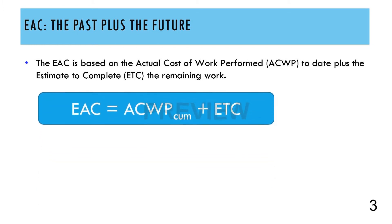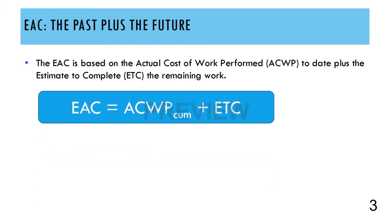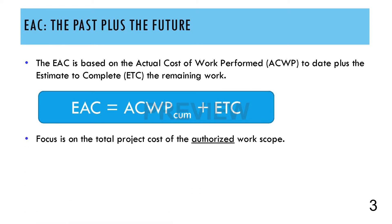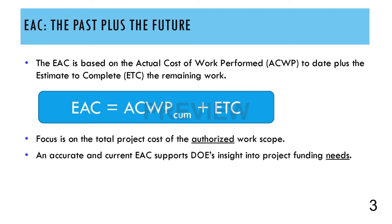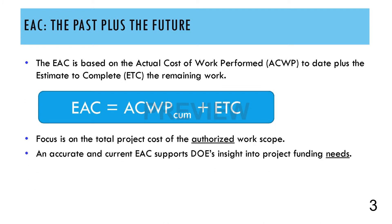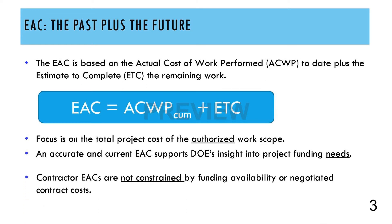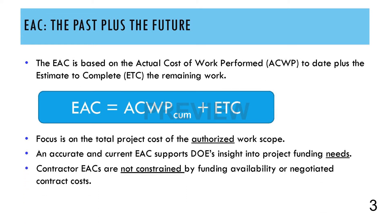The EAC represents the total project cost for all authorized work scope. Work that is anticipated or not yet on contract is not included in the contract EAC, but should be in the FPD's EAC. An accurate and current EAC supports DOE's ability to monitor project funding. However, contractor EACs are not constrained by the availability of funding or the negotiated contract costs.